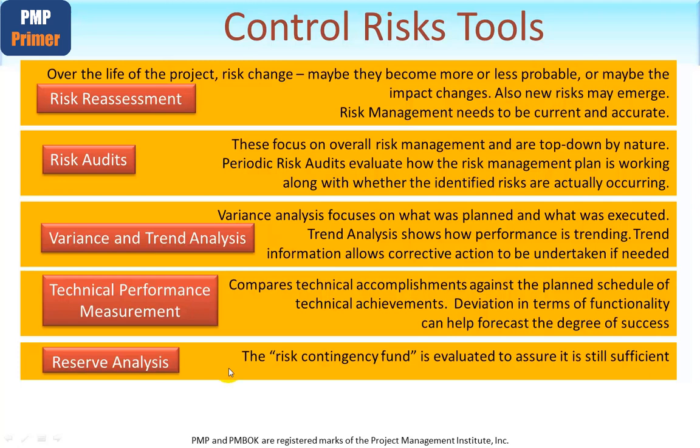Consider this. If there's still money there, then this will refer to potential activities that have yet to be implemented and to use this funding. Therefore, there may be an impact on schedule. If, for example, the number of risks to use contingency are still significant, but none of them have occurred yet, then we need to look at if they should all need this money, will this also have an impact on the future schedule of the project?